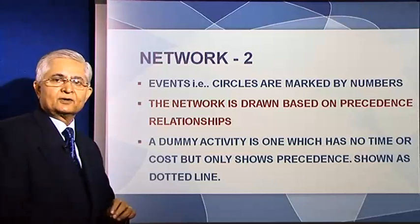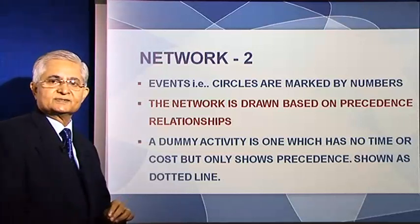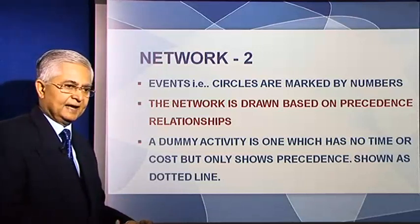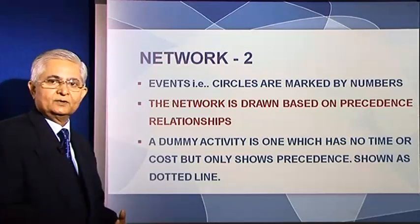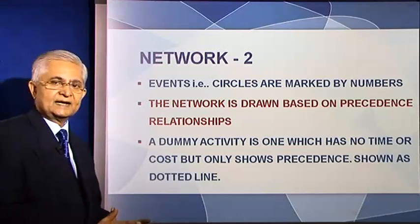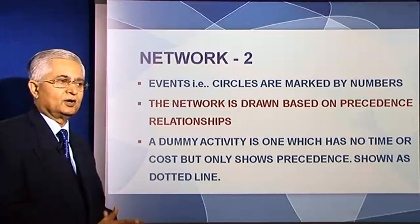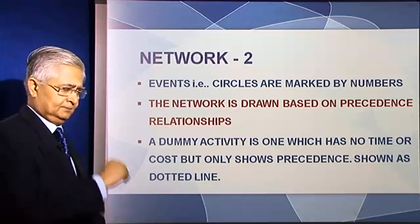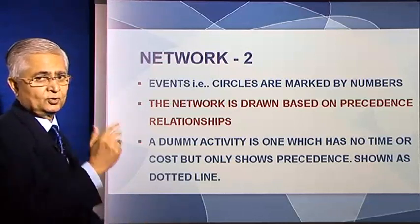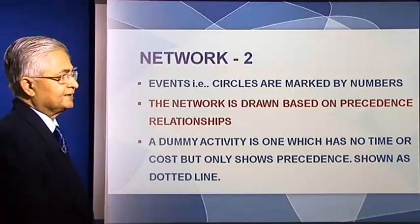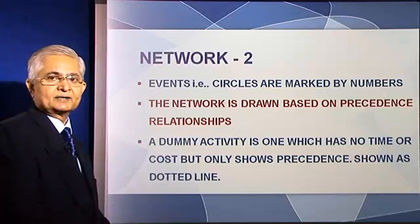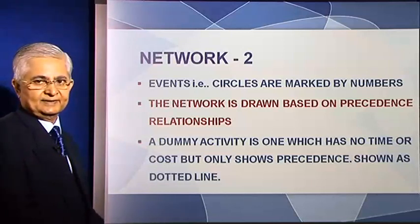We may come across situations where there is an activity which has no time and no cost, but shows precedence. Such an activity is called a dummy activity and it is marked by a dotted line.